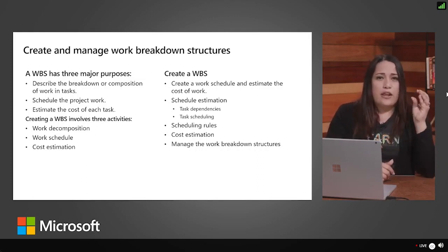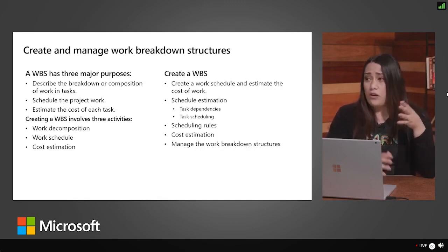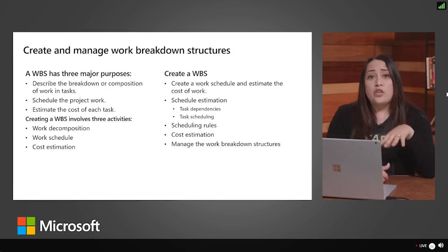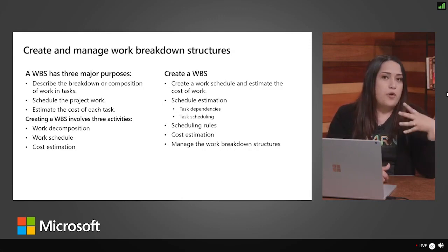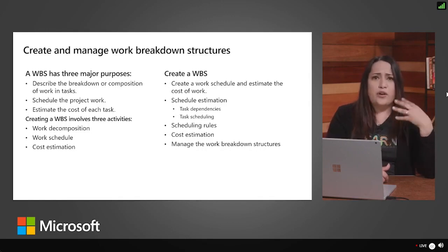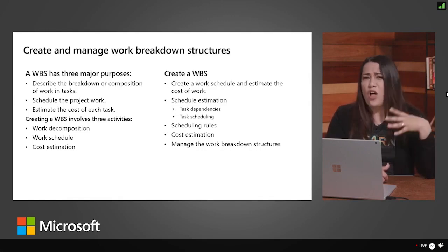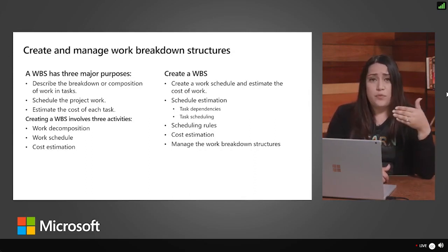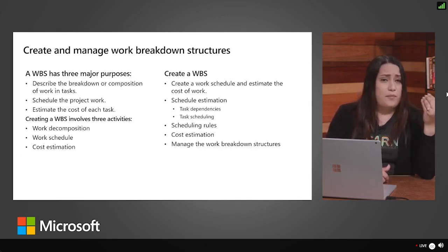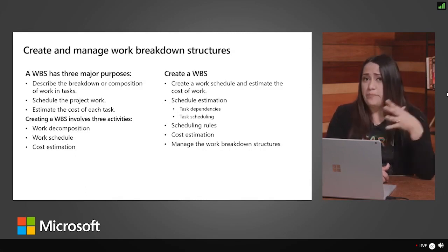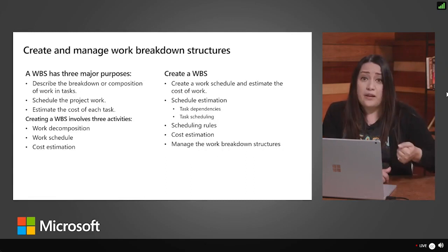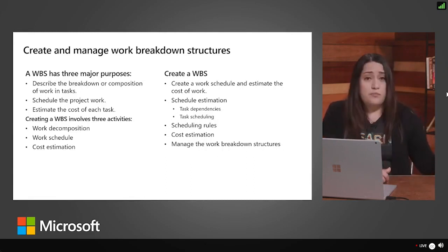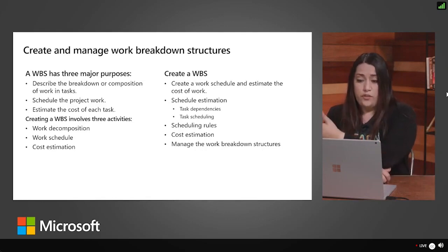This is a tool that integrates the scope, the cost, and the schedule baselines, and it basically ensures that the project plans are all in alignment. You can use WBS templates to create standard templates for projects. So let's say you have a project that you're offering quite a bit, and it has a lot of repeatable work. You can create a WBS template that makes it really simple to move from one project to another. If you have a template from an existing project, all of that knowledge and those best practices that you gathered during the planning portion of the project, it's really simple to reuse on similar projects in the future.